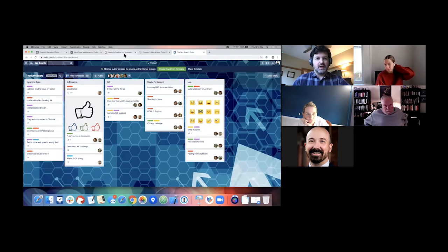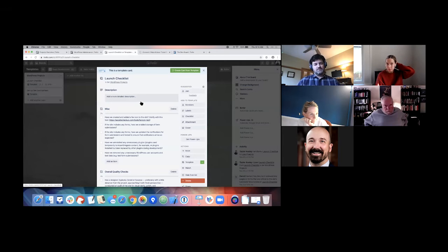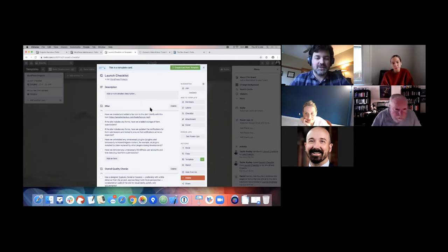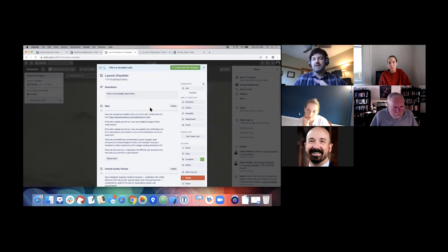So we've launched 2 websites this week, right? We've probably averaged about a launch every 2 weeks for the last couple months. And so we're launching a lot of sites. And when we launch a site, there are a lot of things that have to happen, right? And we've learned the hard way over the years that we need to make a really extensive checklist of these things, otherwise things get missed. Otherwise we launch a site and we forget to add the favicon until right after launch, or we forget to update the form delivery so that when somebody submits the contact form, it goes to the right person at the client or something like that.